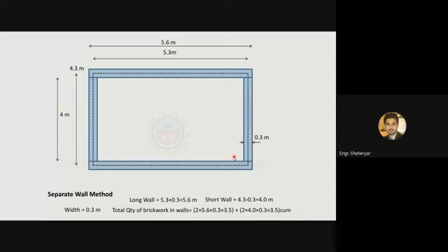Okay, so I'll prefer you stick to your strategy. For the long walls and short walls you have selected for the first step, you must stick to that for the rest of the steps. Otherwise, you'll confuse yourself and you'll make a mistake in the calculation. Okay, if I didn't make a mistake, that doesn't affect the calculation somehow?